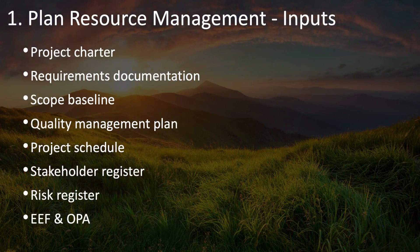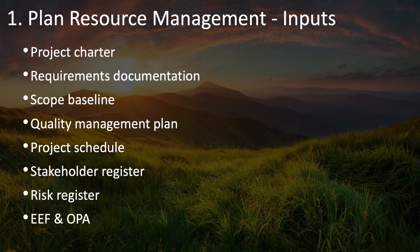The inputs to the plan resource management process start with the project charter, which may include some pre-identified resources that you'll need to include in your resource management plan. Pre-identified resources may be identified as early as the project charter for projects where a specific piece of equipment or personnel with specialized skills or unique experience are critical to success. The project charter can also include any pre-approved financial resources that can affect the amount of money you have to plan for and acquire resources, as well as summary milestones that can affect when you need things done and which resources may be available in those timeframes.